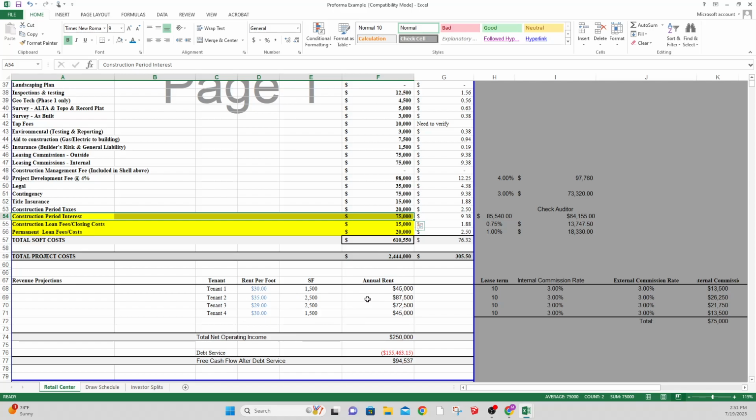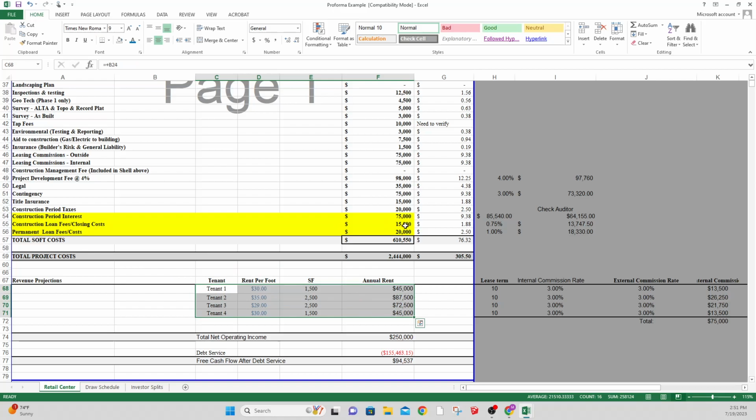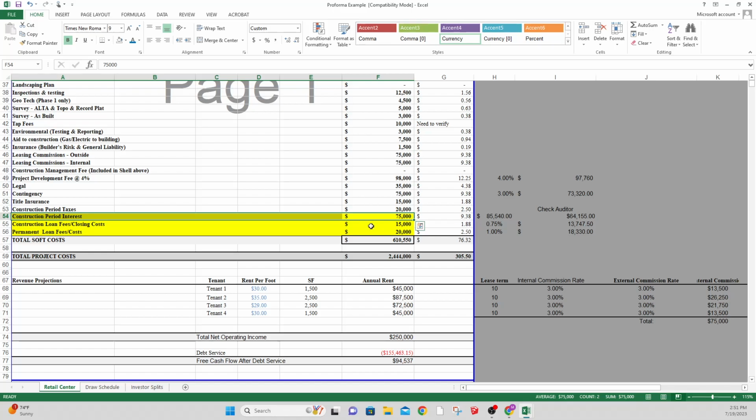Or if your construction loan is like a 2-year interest only and then rolls into a 3-year amortization schedule, or principal and interest payments at that point, that's something to really capture that cost while you're not collecting any rent. There's multiple ways to come up with that number, which we can go into. But that's really what that money is, a bucket of money set aside that you're going to slowly burn off while you're building this until you then start collecting rent from these tenants that are renting the space. I've seen this done multiple different ways.